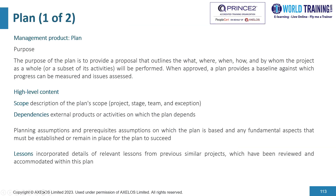One of the management products relevant to this practice is the plans product. When we talk about plans, we are referring to a project plan, a stage plan, or a team plan. The purpose of this document is to provide a proposal that outlines the what, where, when, how, and by whom the project as a whole or a subset of its activities will be performed. When approved, a plan provides a baseline against which progress can be measured and issues assessed.